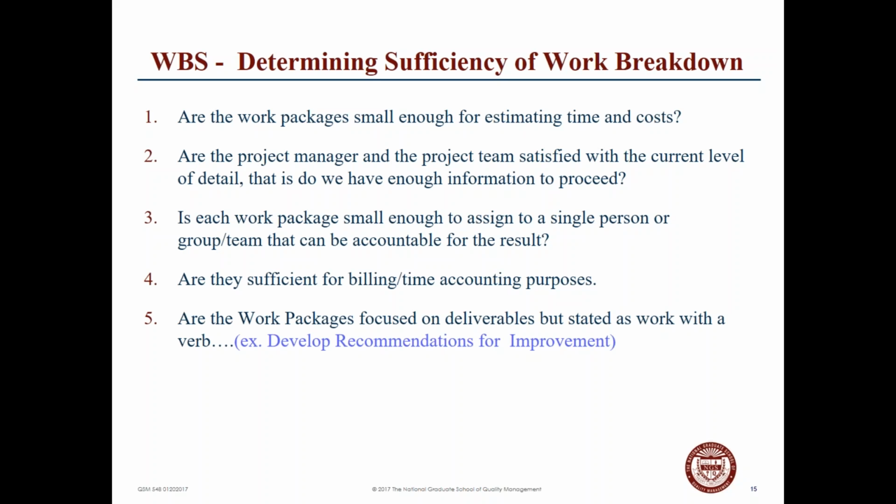Is there enough detail? Do the manager and the team feel the appropriate level of detail is satisfied, or that it provides enough information to proceed? Can you assign these packages to a single person or a team who can be accountable for a result?